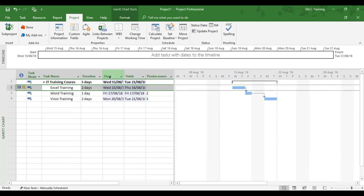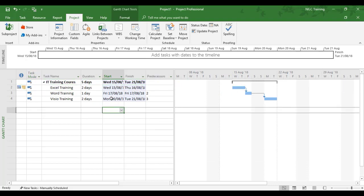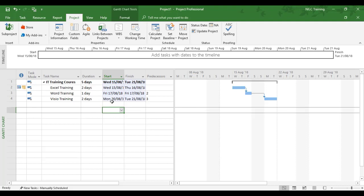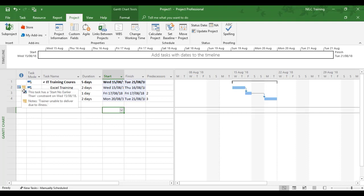Everything has moved now to the 15th for the start of our three dates together, and we can see it's shifted everything two days on. The Word training has now gone to the Friday, the Visio training has gone to the following Monday, and we can see the effect of the constraint. The beauty about the constraint is it's now got a note with it to tell you what the reason was.